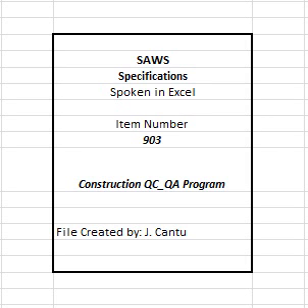G. Project record documents. 1. Maintain records and documents throughout construction process. 2. Prepare final submittals on items required, including but not limited to, as-built drawings, specifications and addenda, approved shop drawings, material samples, construction photographs, change orders, contract modifications, testing and analysis records, survey data, construction reports such as daily reports, monthly reports, payroll records, and safety data such as MSDS, safety meetings, incident reports, etc.